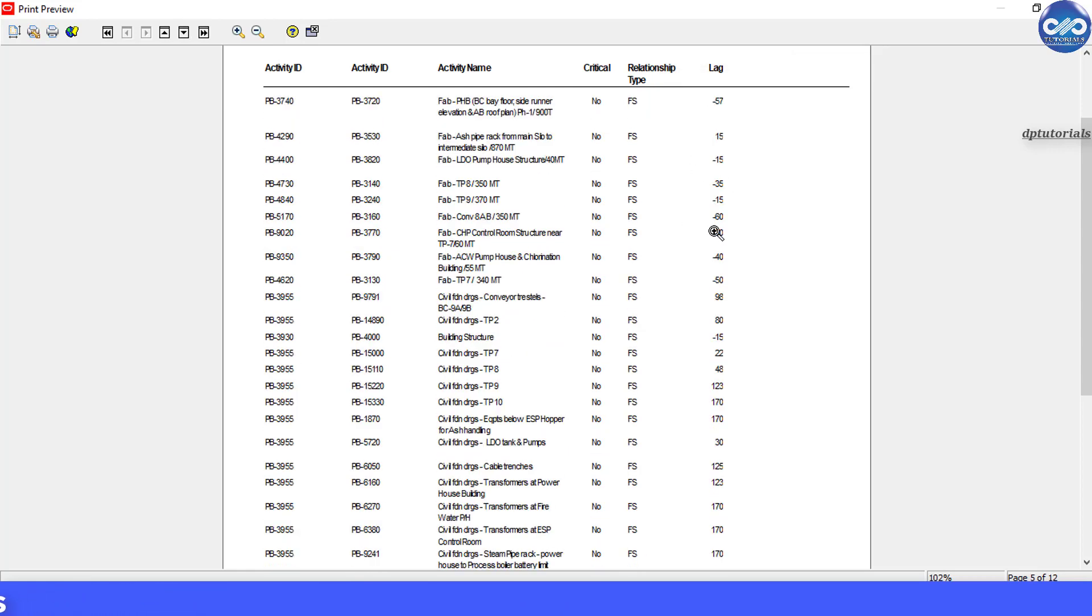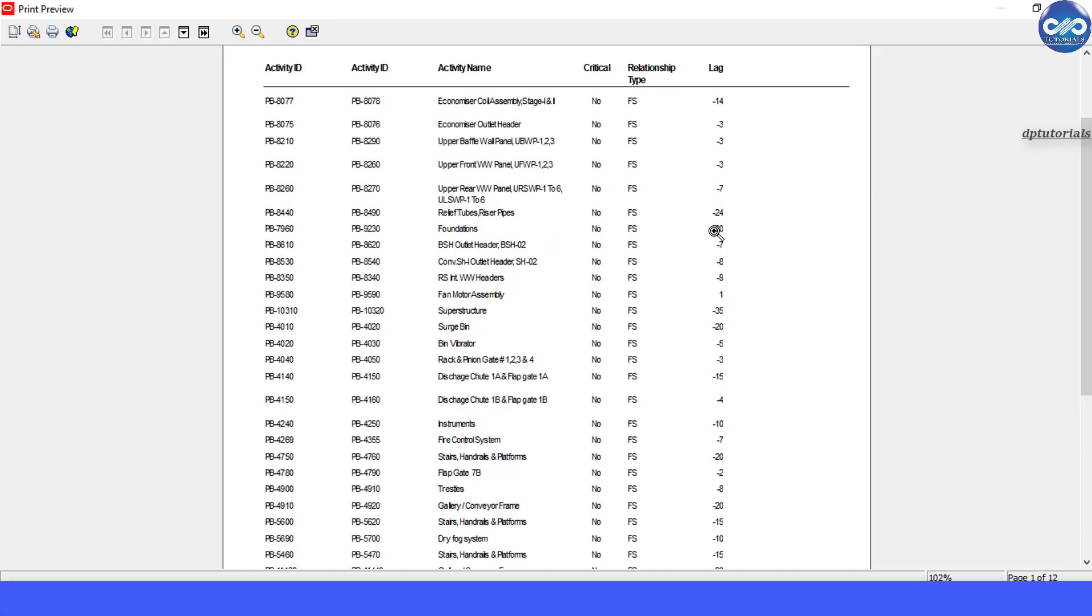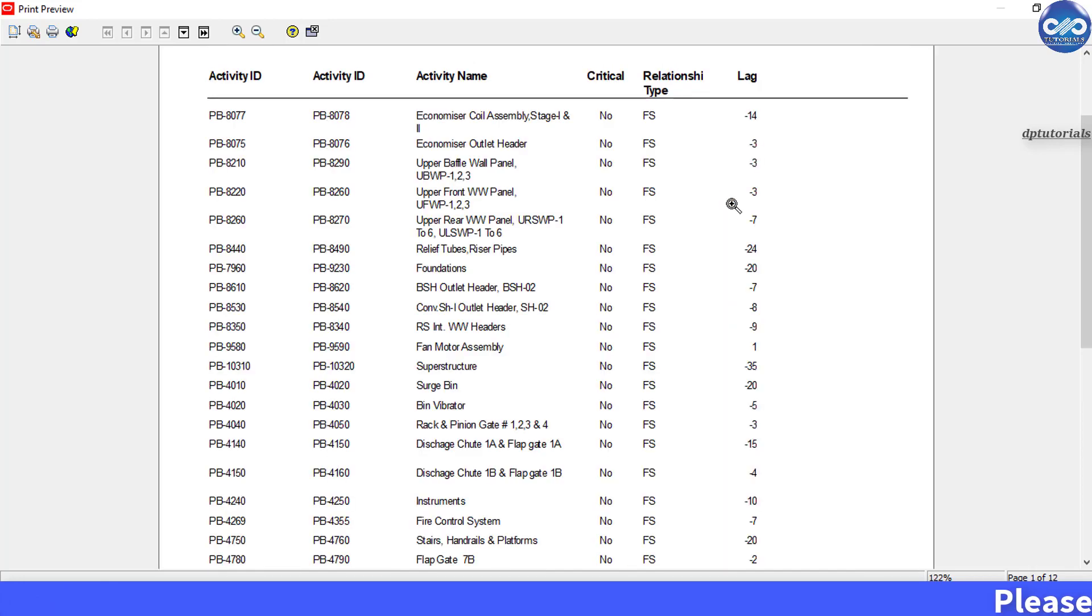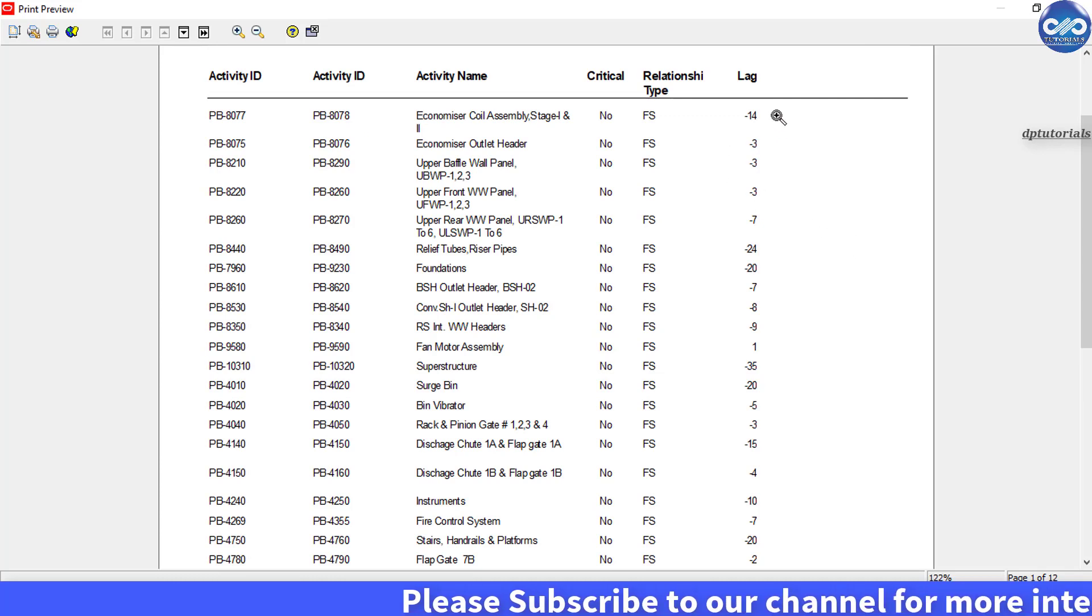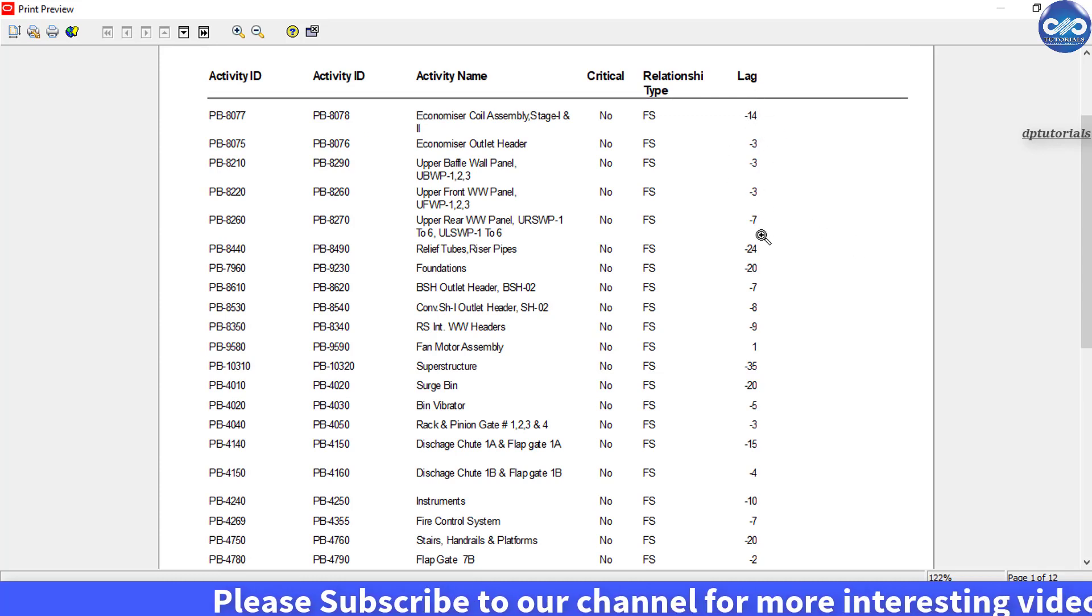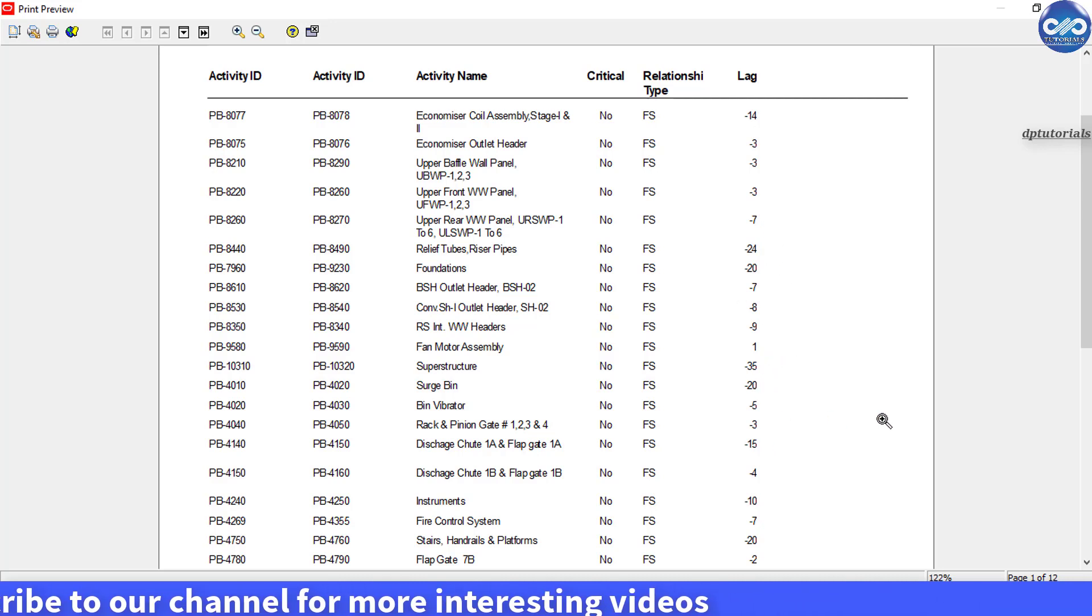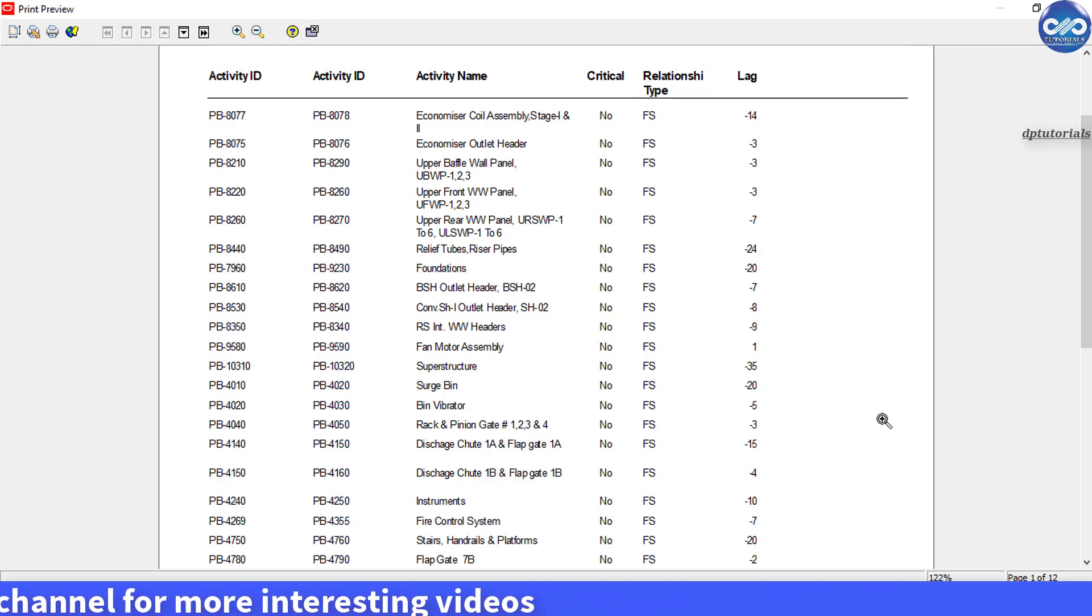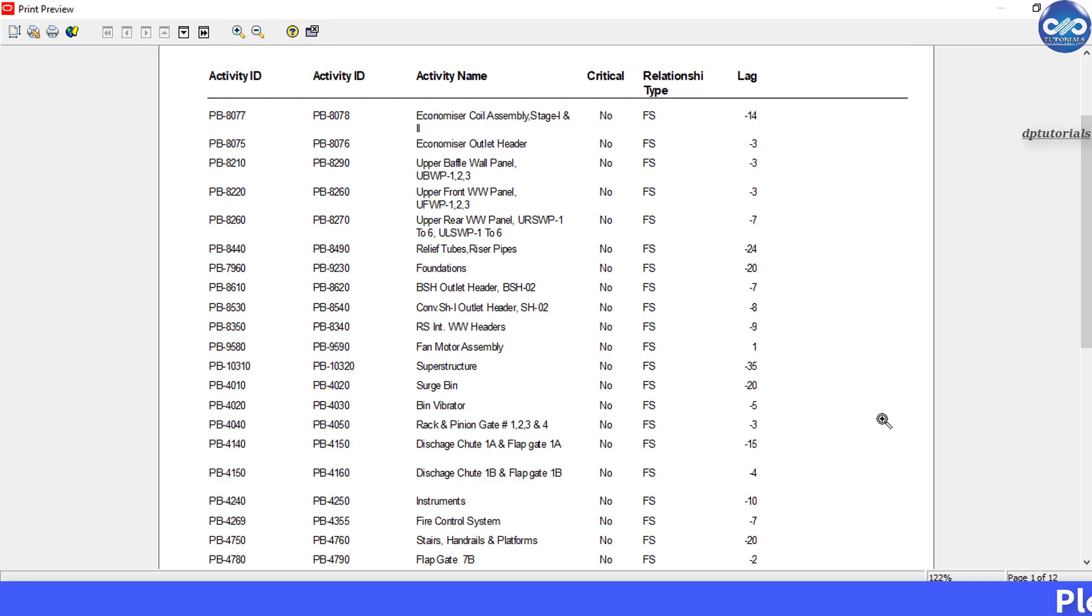So in this way you can run the relationships lag report in Primavera P6. If you want to still use lags in your project schedule, I seriously recommend that you document and note all the reasons for putting the specific lags in your schedule. This will certainly help everyone to understand your scheduling logic in a much better way.